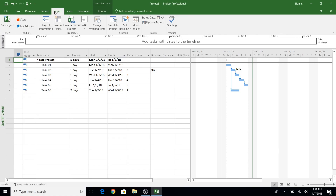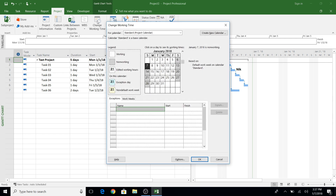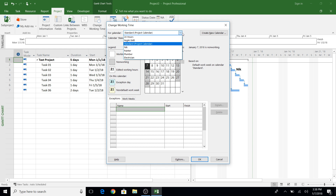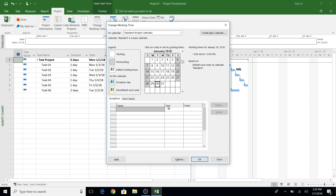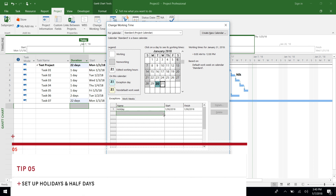Number four is setting up your calendar. If you have different employees working in different locations, or they are working in different time zones and follow different holiday calendars, it's always a good idea to set up the different calendars. In MS Project, go to the Project menu and select Change Working Time. The default option is the standard project calendar. From there you can create a new calendar and copy the base calendar. If you want to change the working time, just pick a date, click on it, and enter the name of the holiday along with the start and finish times, and project will not use that date for any calculations.